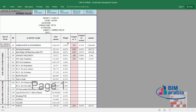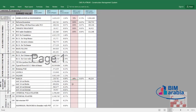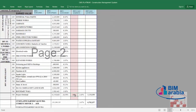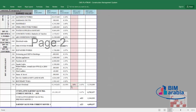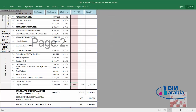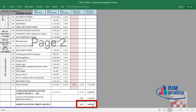For mobilization and engineering we'll finish at 70% instead of 15%; termite treatment is 100%; PCC and foundation also 100%; block work of substructure also 100%. The overhead cost is calculated automatically according to time consumed, increasing gradually each month by the same percentage. In month 3 we are at 10%. Accordingly, the cumulative earned value is 6,702,157, and the earned value for the current month only is 4,458,157.